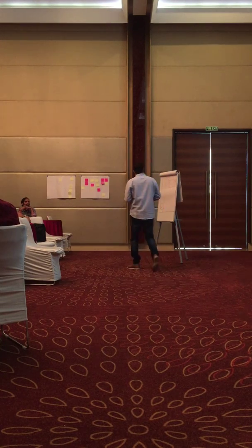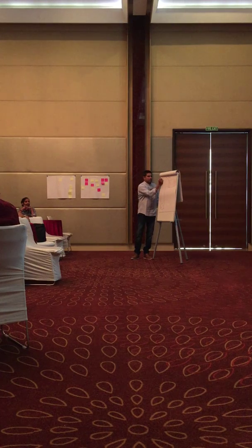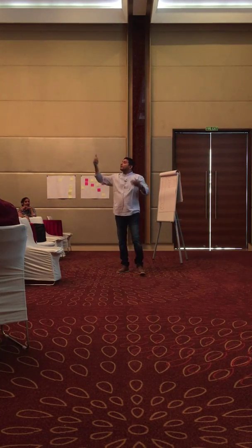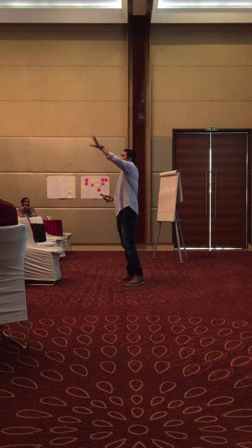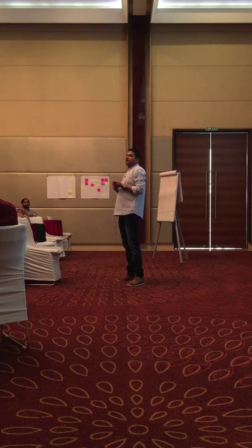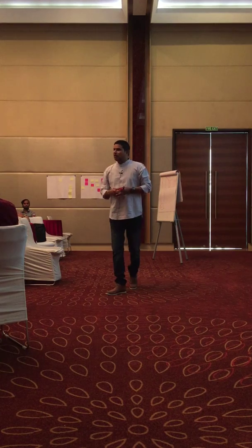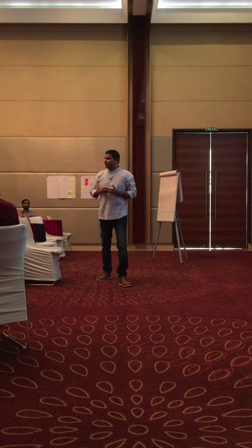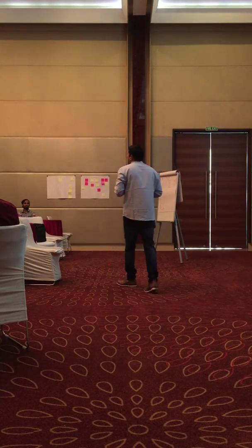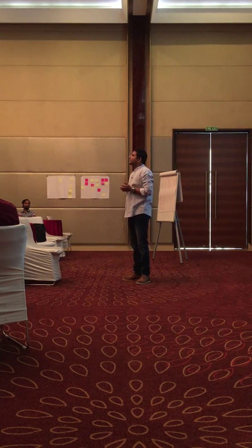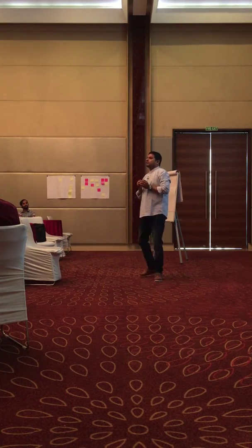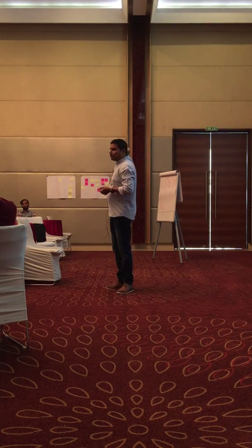Right? So now, what is the first criterion to put something on the top? Oh, I have 10 items. No, we are talking about the prioritizing concept itself. If I want to give priority one to one item in my 10-item backlog, what is the criterion for that? Business value, right? So high business value should be kept on the top. Why? There is a principle, the first principle: our highest priority is to satisfy the customer with early and continuous delivery of valuable software. So if you release something the customer is not interested in, you do not put it on the top, put it on the bottom. If something is very interesting to customers, you see it generates a lot of revenue, then automatically it will be on the top. Agree?